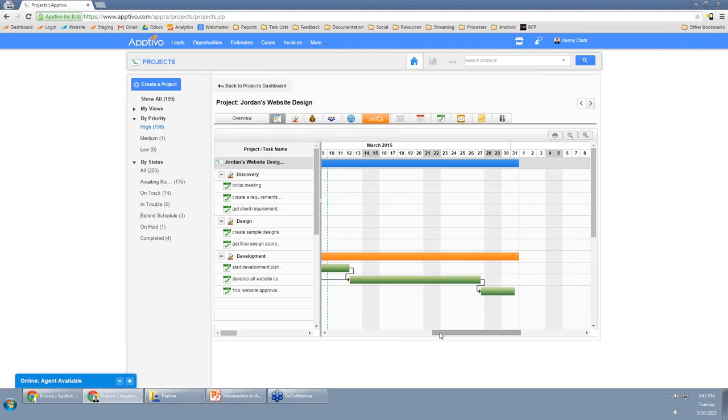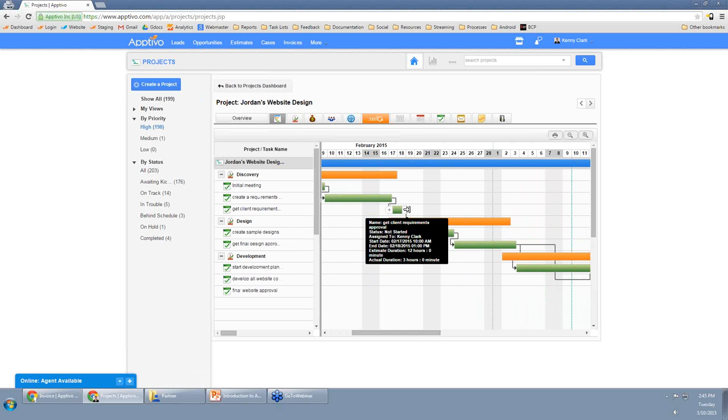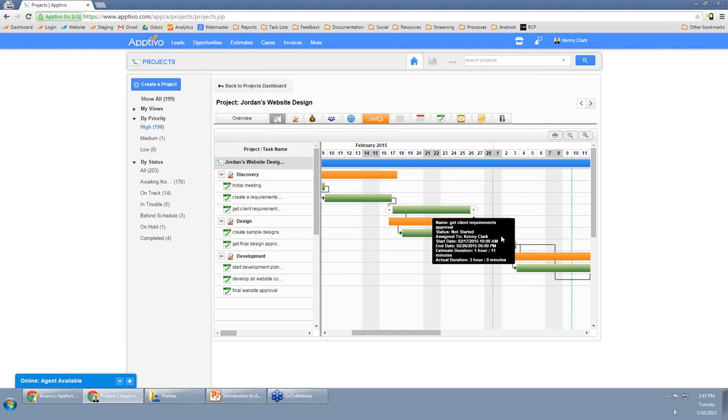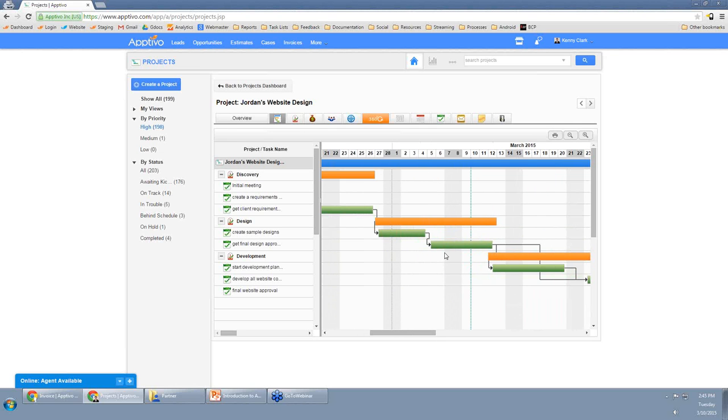Apologies, seems like my internet's having a little bit of hiccup there. So here we got our Gantt chart, and what's really sweet is I can take this, like let's say a client delays one of your tasks. I can actually drag this, and it'll delay the rest of the project schedule appropriately. So now those tasks sitting in your main agenda, they're all pushed back to the appropriate time. So everything's kind of interconnected like that.